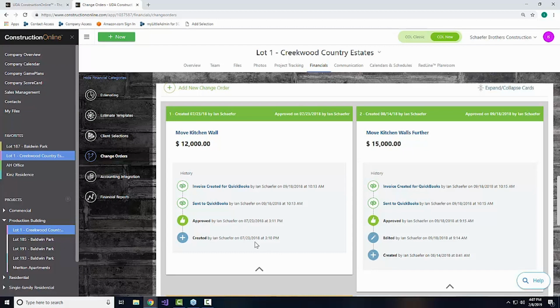Yeah, and to touch on one of the questions that actually came through in regards to change orders, we're also locking the change order as soon as it's approved, providing the date and the user that approved it. You can see this information up at the top, which does by itself make it legally binding in a lot of areas. We add to this the ability to request the signature line as well to further cement that need. Now, this also stands up to a lot of the legal scrutiny as well, because now if we go in and make a change that would affect any of the price tags on the job, it offers to reset the change order to re-request that approval as well.